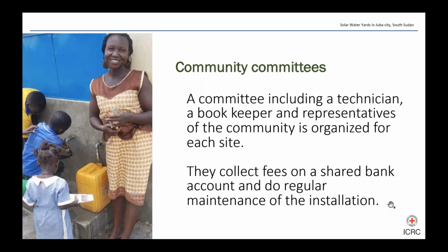The official handover of the large solar water yard marks the end of the responsibility from the ICRC to the community. We provided a 2-day training session on financial management and the technical components of operation and maintenance. Now the community members are practically learning how to manage their own water yards. According to the credo, you're responsible but not alone. The ICRC continues to monitor the development of the projects and provide support whenever needed.